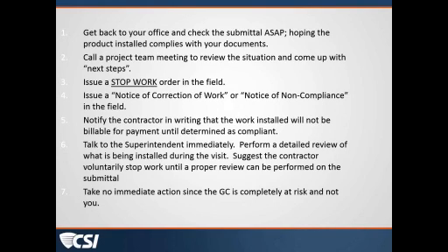And I have found it to be wonderfully successful if I can hold a meeting with the general contractor to talk about what that submittal schedule really ought to be like. Because, and that's part of the reason that we use this example, foundation waterproofing is one of those that come pretty early in the schedule.